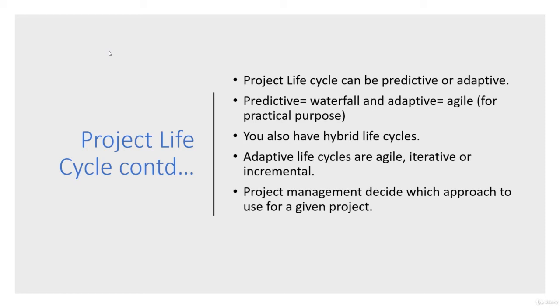If projects are small, uncertainty is really low, requirements are clear, then usually waterfall is the preferred way to go forward. Let's say 40 to 80 hours of effort, maybe 2 weeks. Changes are not much. In that case, there is no point in having all those scrum calls and sprints and planning.